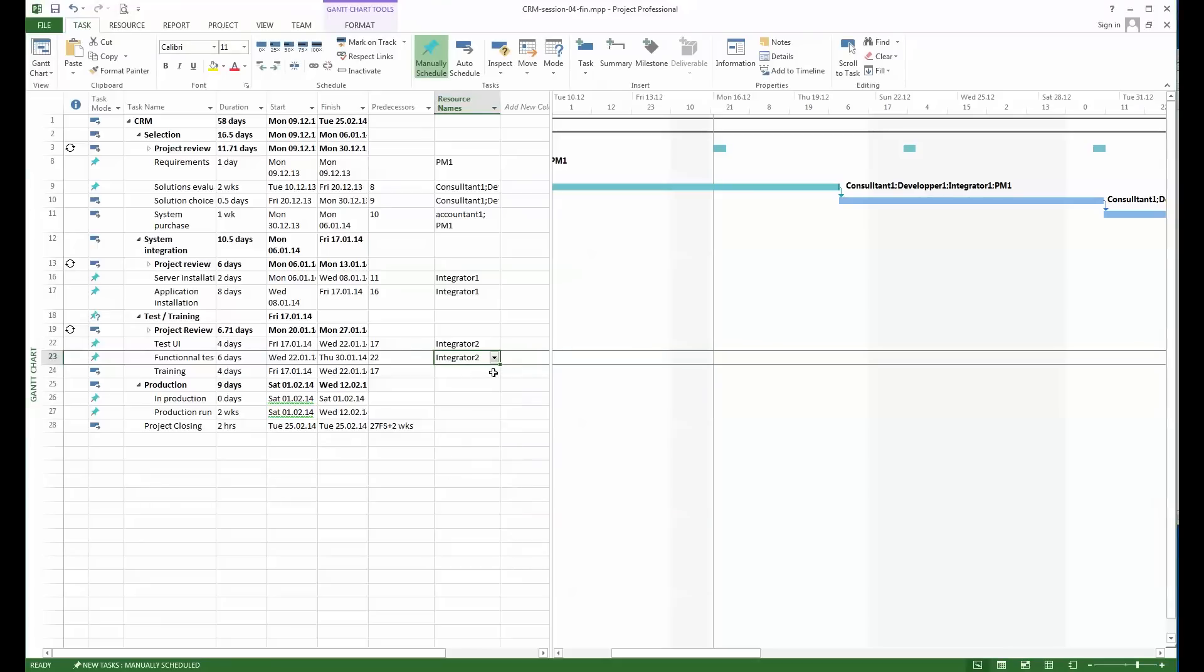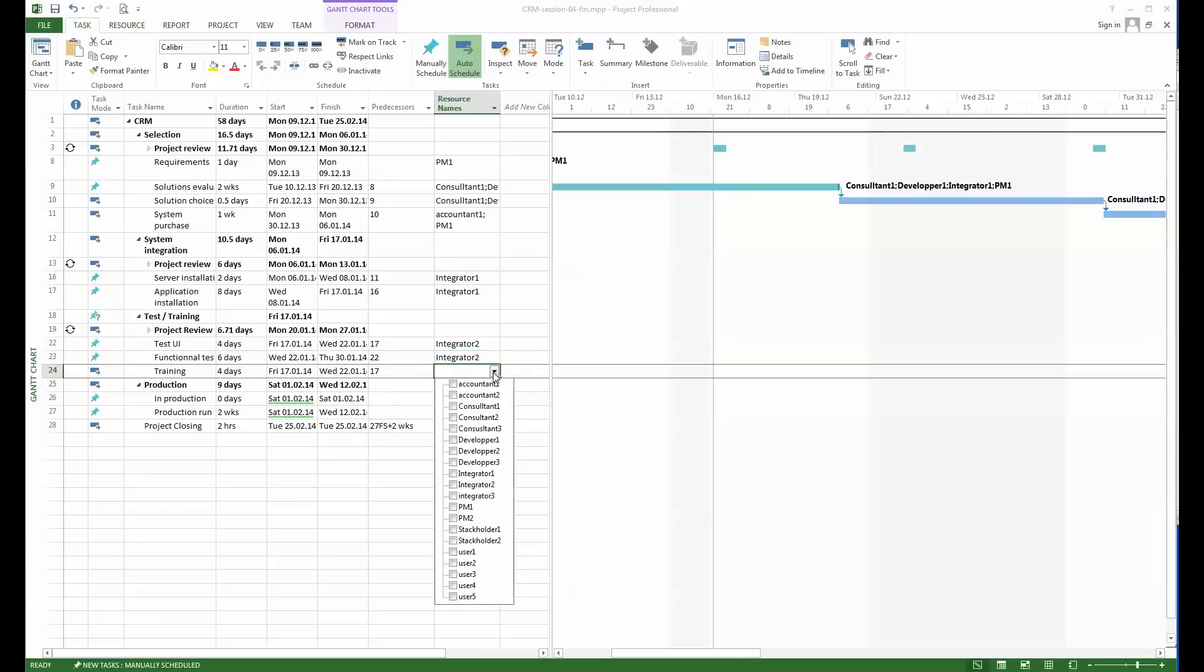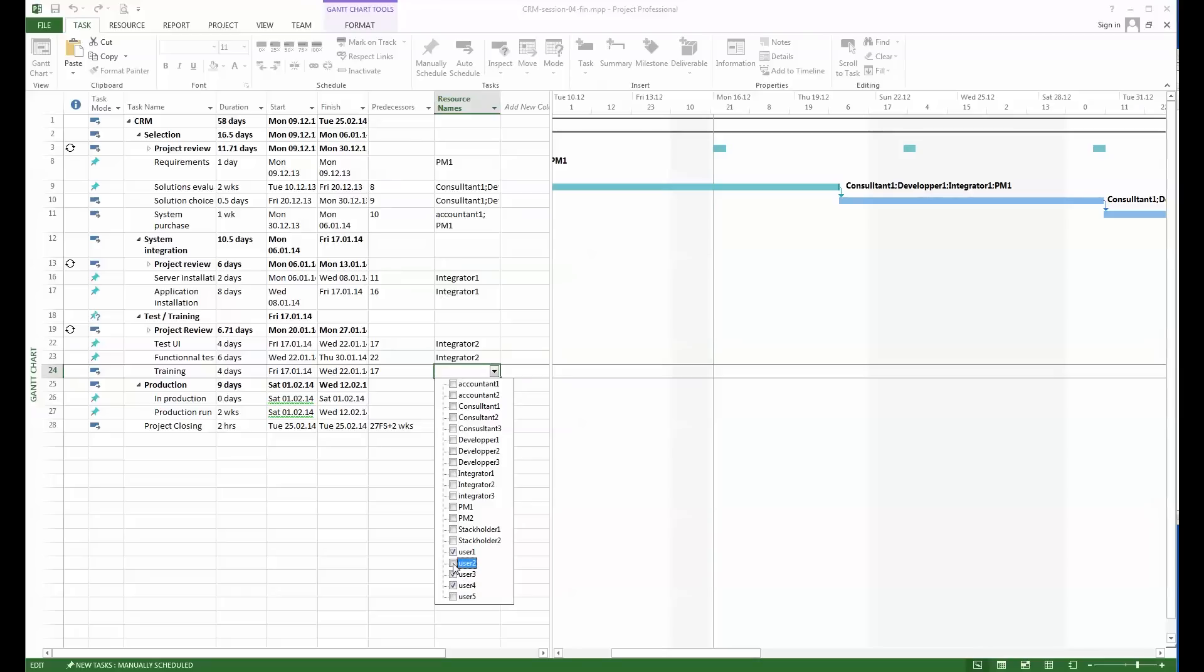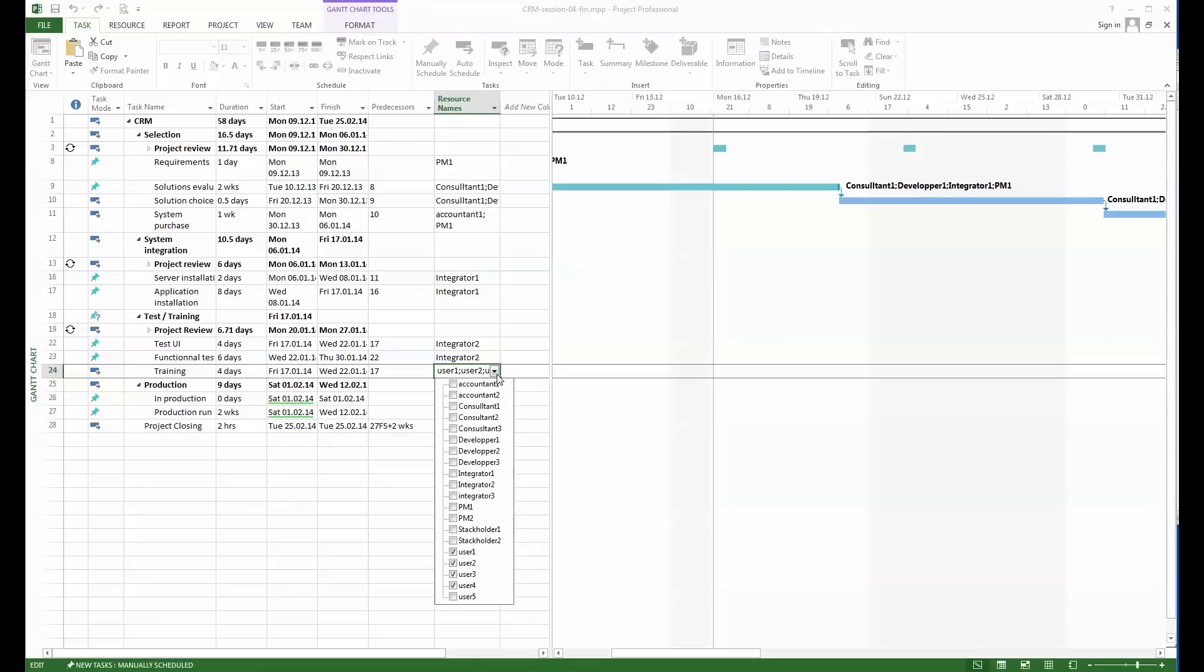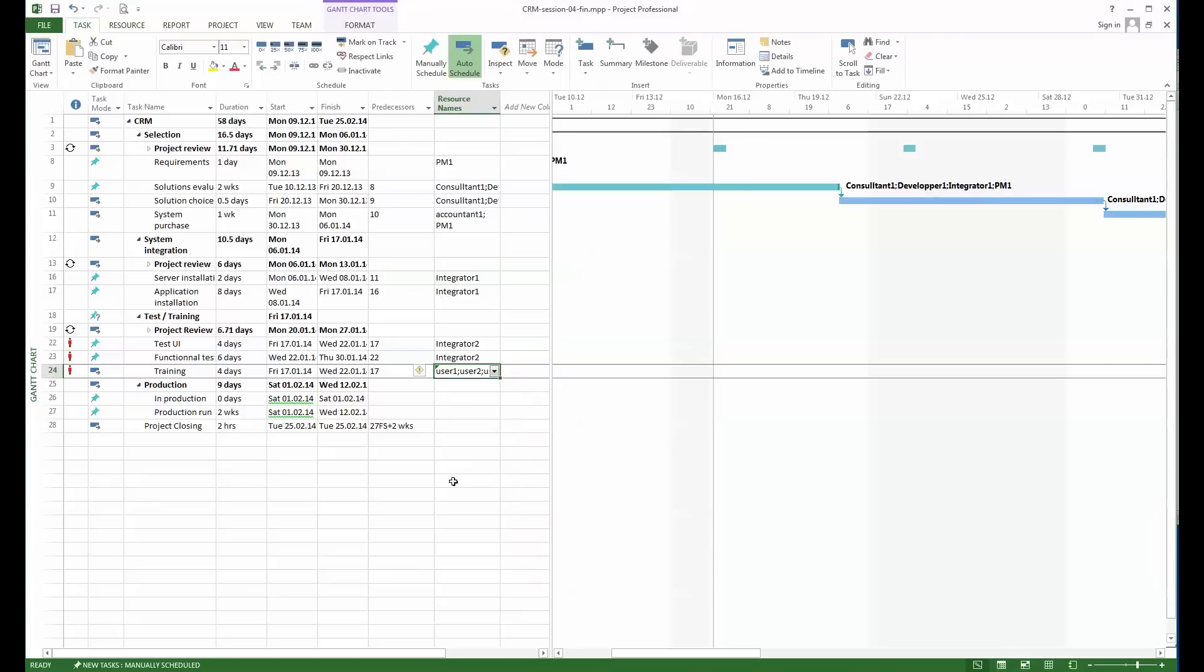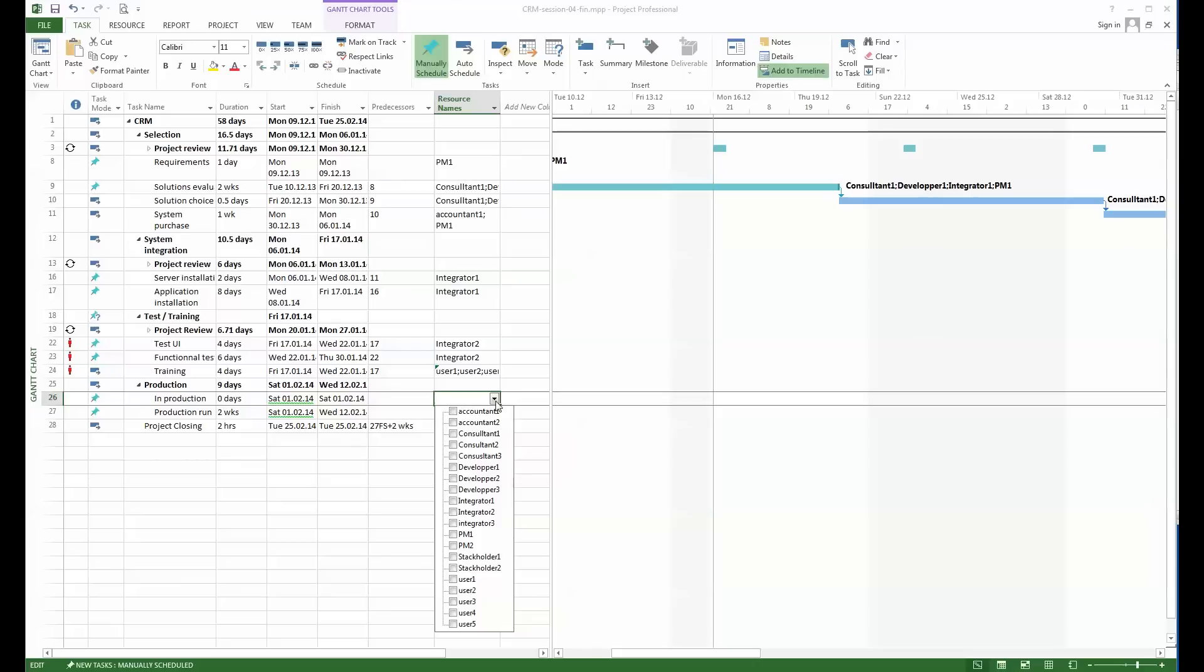The training—for the training then we'll have there maybe something like four representatives of the users and why not also to add integrator 2. With this we've defined the resources that will work on the different phases.